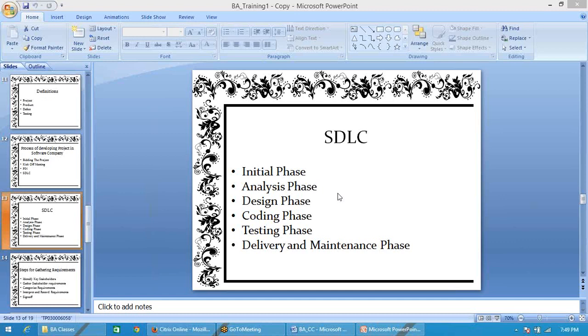So, can you please help me with this? The first one is feasibility study. Yes. Feasibility study is nothing but a detailed study of all the requirements, whether with the existing resources we will be able to develop those requirements or not. Okay. Then a tentative planning is where we will be doing estimations like how many resources are required for that complete project to be developed, both technical resources and human resources. That planning is done under tentative planning. Okay. And then the technology selection.